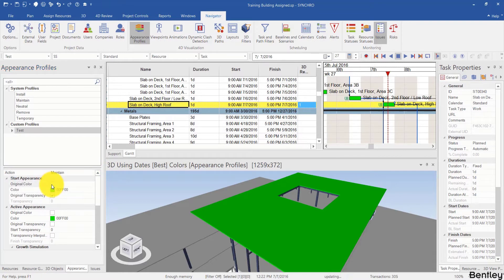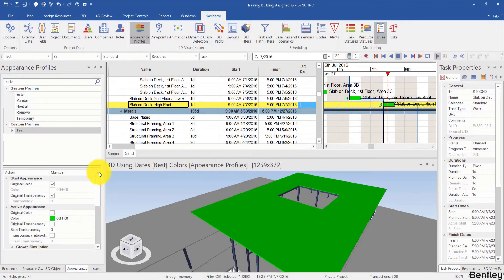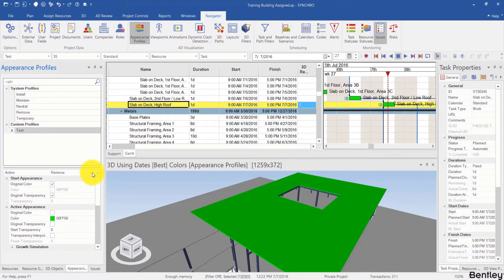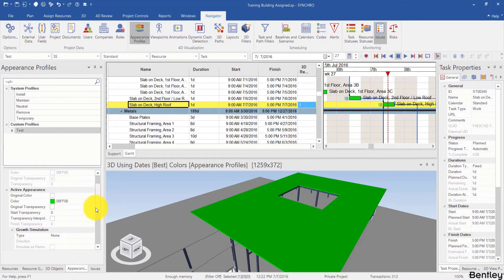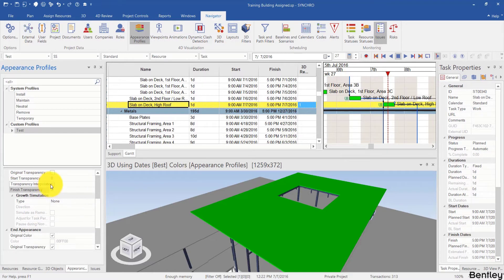If I use Maintain, I can change the start appearance and the end appearance. If I change it to Remove, I can change the start appearance but I cannot change the end appearance. I will change it back to Install and continue to customize more details. For example, I can change the color, the transparency, and check the box for transparency interpolation — that will start with totally transparent and gradually change, or the other way. And I can give it a growth simulation if I want.